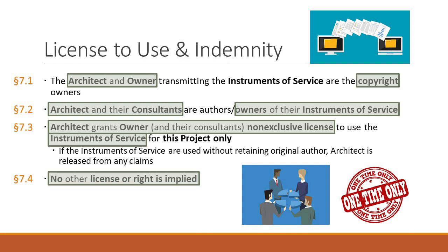And so that's one thing where I think I've told you guys the story of where I represented the lighting designer. They got fired. They weren't getting paid. The owner brought in a new lighting designer to finish out the drawings, and the project was currently underway. They were owed about $450,000, and I went to federal court because copyright law is federal law, and I went under an injunction under Article 7.3, and I said, we haven't been paid, we terminated our agreement, the license has expired, they are infringing our copyright, and we were able to get my client paid relatively quickly because this is pretty cut and dry.